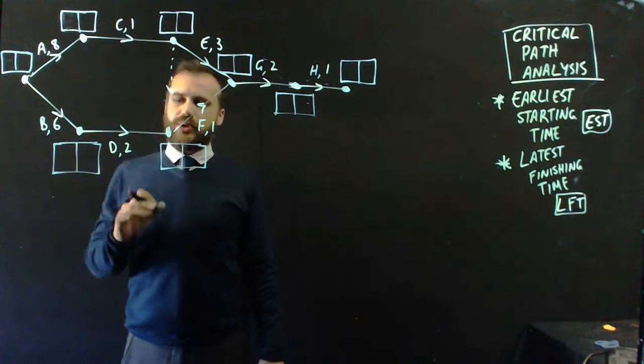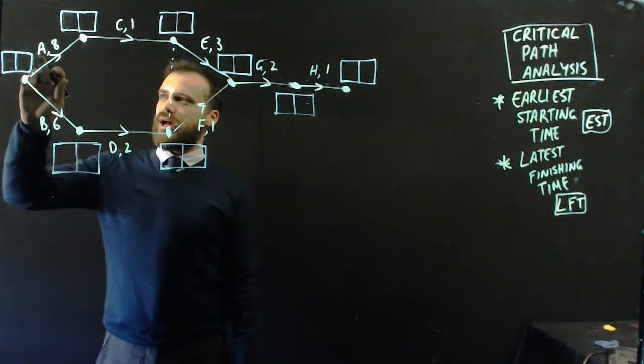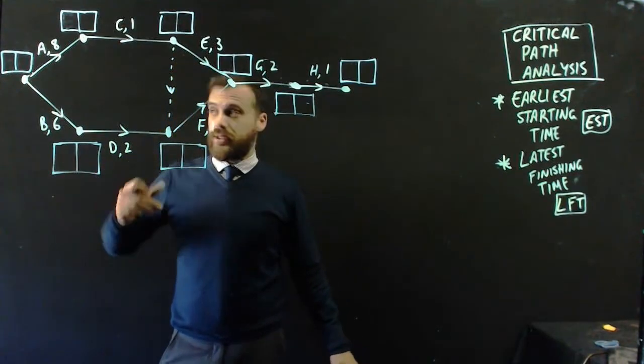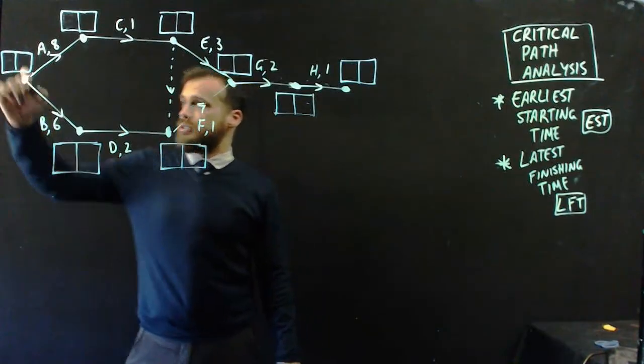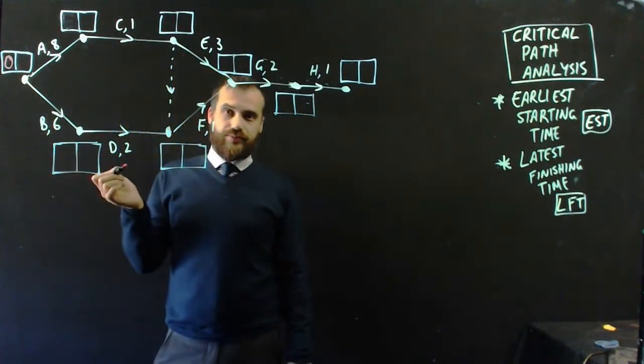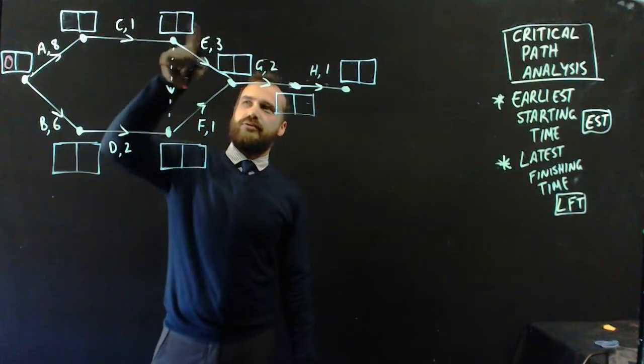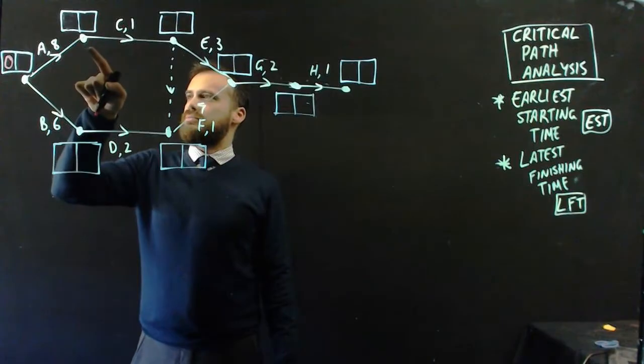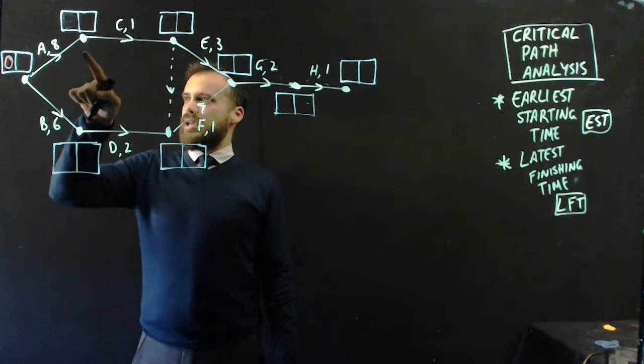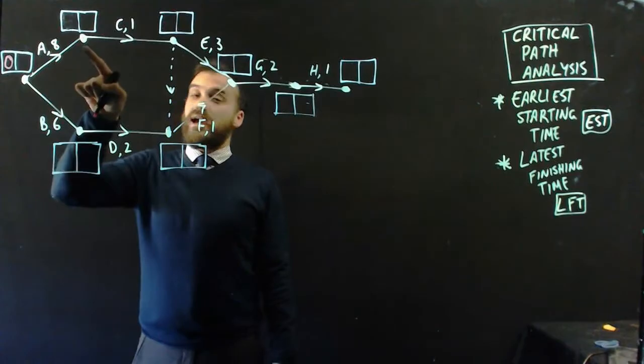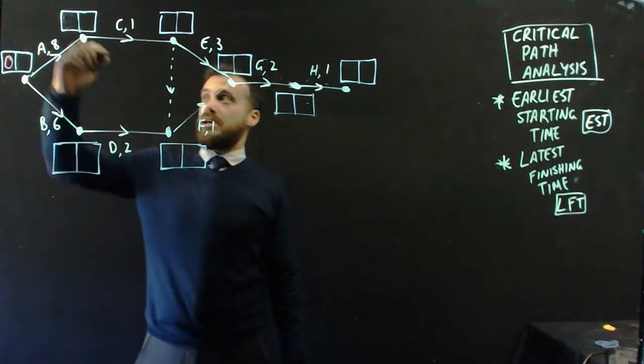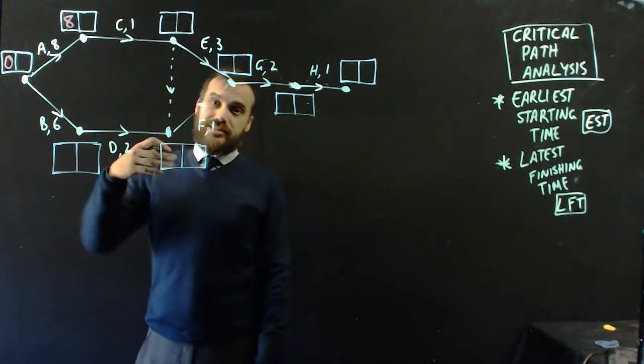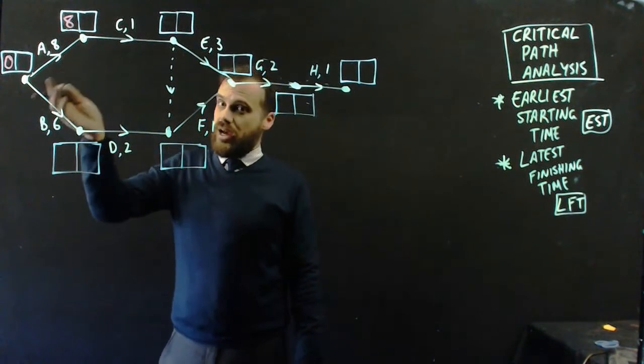Now this first double box is really straightforward. What's the earliest that A or B can start? Well, they can start as soon as somebody says go, right? There's no predecessors here. So they just start at time zero. Straightforward. Let's follow this one for a second. When can C start? Or, another way to say it, when does A end? A ends after eight hours, which means that C can start after eight hours. Now that's its earliest starting time. It can't start at seven hours because A won't be finished yet and A is a predecessor.